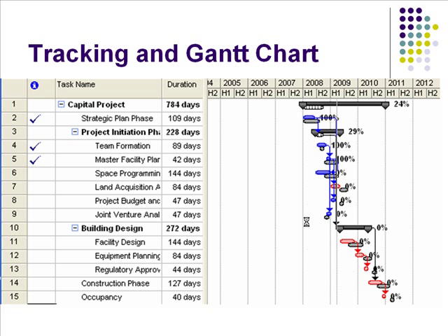Check marks indicate that a task has been 100% completed. In the Gantt chart on the right, the blue lines show the actual activity, the gray lines show the baseline planned activity, and the red lines show the critical activities to be completed.